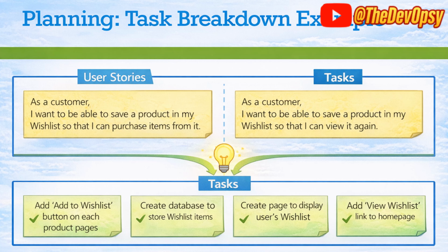The team will decide this when we discuss what things are needed. Maybe I considered only two items and gave an estimate of maybe three. But then Nadeem says, hey, I will take 5 days, 5 story points. See, even I'm saying days, 5 story points. And then Nadeem will say, you know what, we also have to create a page to display the user's wish list. And then I'll say, oh yeah, I did not consider that. And that's how you come to a consensus.